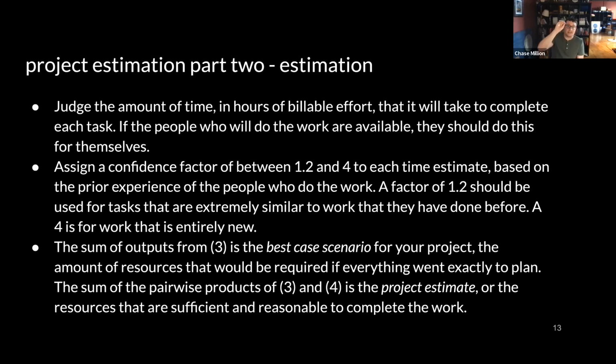The other thing you can learn from this is by doing a pairwise multiplication across the initial estimate and the scale factor, and then summing that. That produces what I will call the project estimate. This is the amount of time, of resources that are likely reasonable and sufficient to achieve the project objectives.